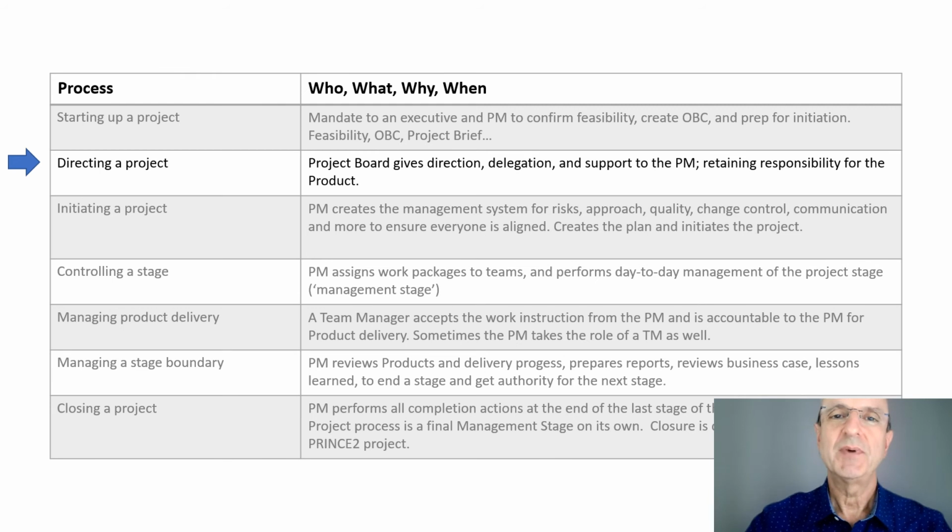Directing the project is the responsibility of the project board. The project board is designed during the startup phase. So although it's designed and you may have decided who's going to be on that board, it doesn't exist until the project itself is authorized. And this fulfills the principle of clear, defined roles and responsibilities. It's making sure the right people are on the board, and that would have been agreed at the time of the startup. And then it's ensuring that that board knows what they should be doing throughout the life of the project.